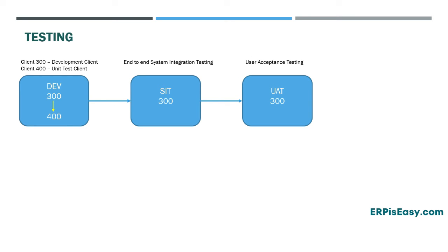Once the SIT is successful, the changes will be transported to the UAT system to perform user acceptance testing. This is where the end-users will test the business processes and configurations before giving the green light to go live. If the user finds a bug in the configuration, it is called a defect. The defect will be resolved by the consultant in the development system, and they will follow the same process up until the UAT.